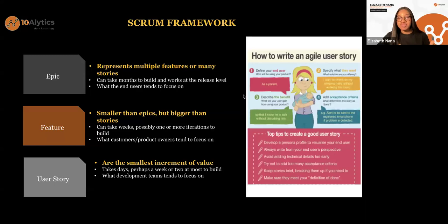That is step 3, describing the benefits. What will your user gain from using your products? As a parent, I want to check on my sleeping baby without entering the room, so that I can know that he is safe without disturbing him. That is your user story. That is really just what your user story is.